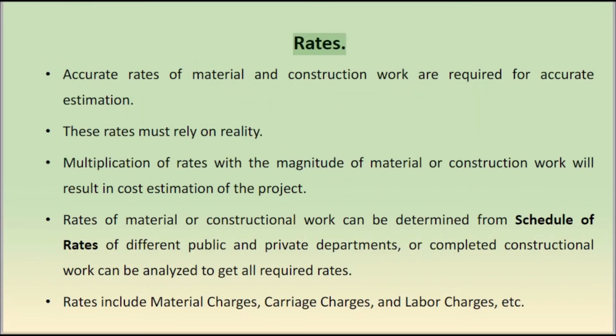Rates. Accurate rates of material and construction work are required for accurate estimation. These rates must rely on reality. Multiplication of rates with the magnitude of material or construction work will result in cost estimation of the project.